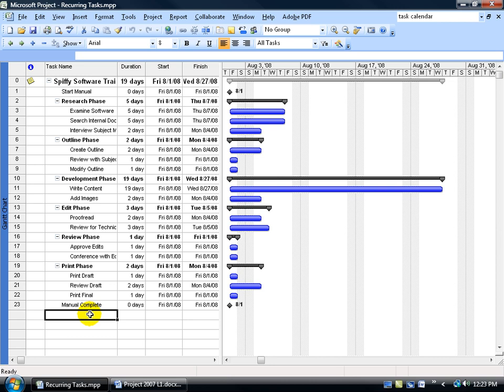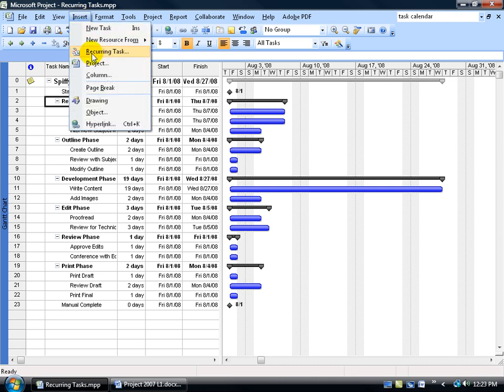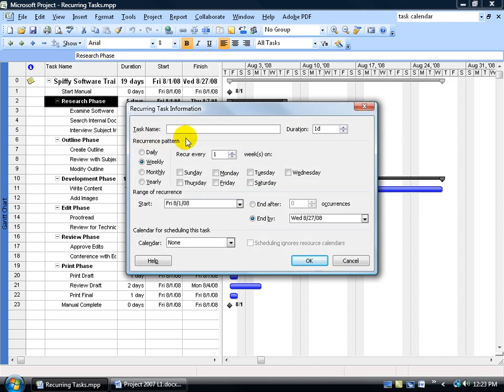A recurring task is a task that occurs over and over again at regular intervals. For example, we want to have project meetings every week or every other Tuesday. Let's insert a recurring task for project meetings just below the start milestone. Select the task below it because when creating or inserting a new task, whatever we've got selected will push down and everything underneath it. To insert a recurring task, come up to the Insert menu and go down to Recurring Task.